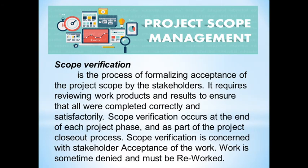Scope verification is the process of formalizing acceptance of the project scope by the stakeholders. It requires reviewing work products and results to ensure that all were completed correctly and satisfactorily. Scope verification occurs at the end of each project phase and as part of the project closeout process. It is concerned with stakeholder acceptance of the work — work is sometimes denied and must be reworked. Scope verification ensures that deliverables are in alignment with the project scope and measures the accuracy of the work up to the point of cancellation, not work that was to be completed after project termination.